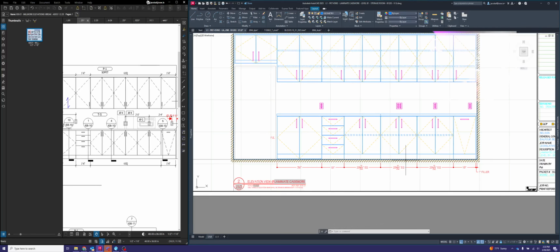So when you think about it, the project manager is going to release the drawing with those new field dimensions once they know what they are. And when they do that, if we put these EQs on here, that's going to make sure that they understand that if they grow or shrink this elevation, those cabinets have to stay equal to each other. You can't just change one of them, they all have to change if you change one of them. So, all right.